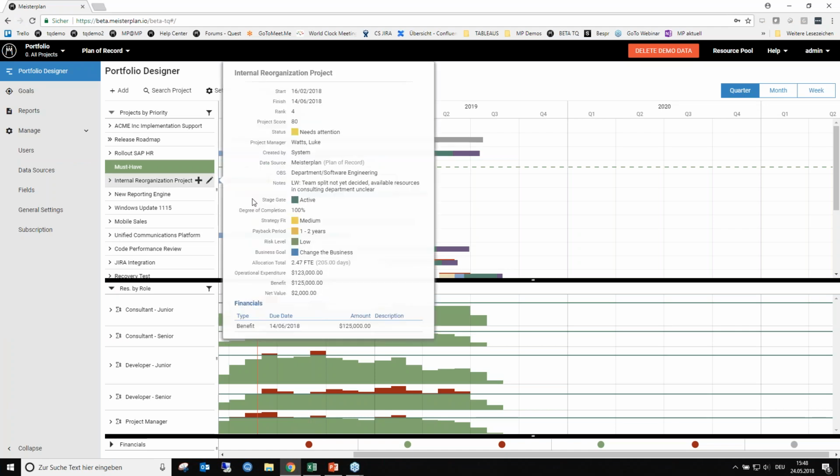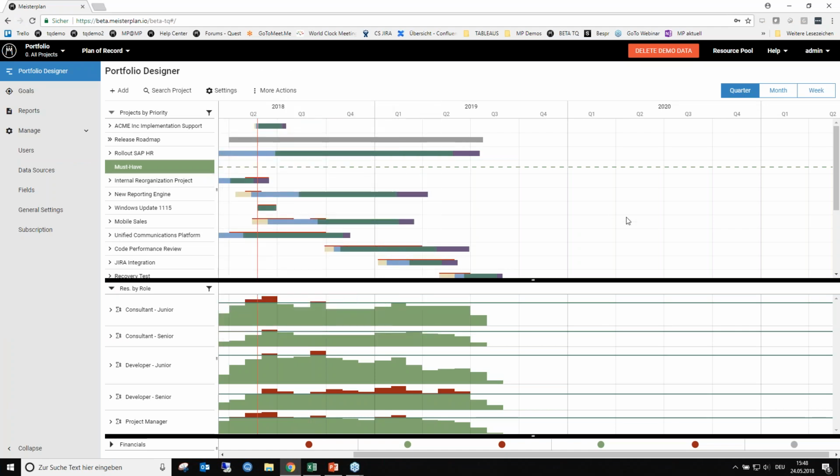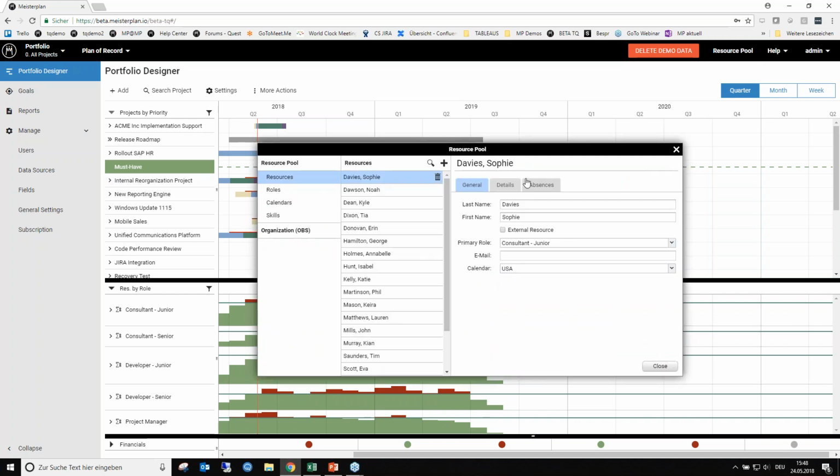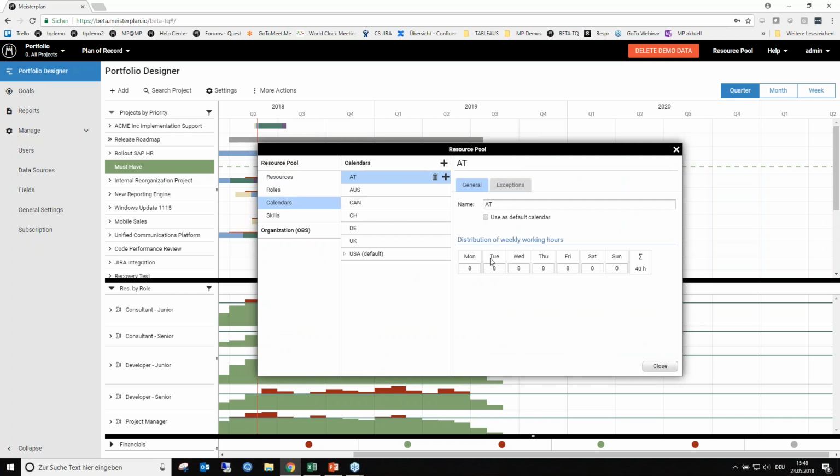So my recommendation is, basically you have 2 ways to approach that topic. One way would be to deduct that from an individual's capacity indeed. So you can either give that IT resource an individual calendar with a lower amount of working hours a day, so you would only cover the amount of hours available for project work.